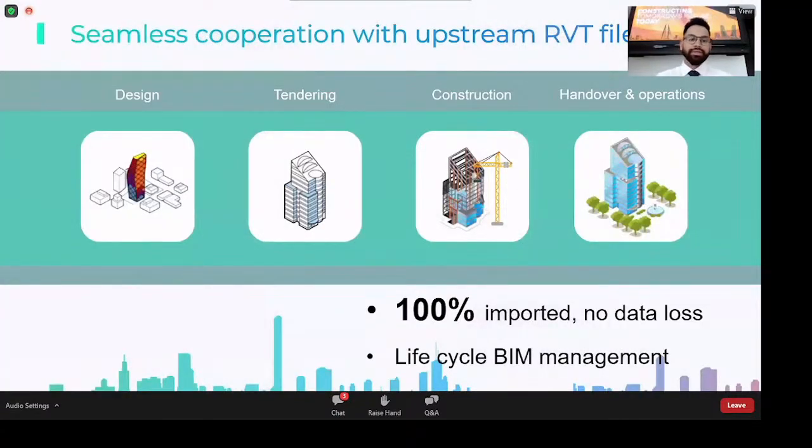To be very honest, once you have a BIM model with information fed in it, it's going to help you throughout the construction lifecycle. Using a virtual model during the design stage, we can verify design at a very, very early stage of the project, which can save us a lot of time and expense by speeding up the process of design changes. Obviously, in every project, we tend to have a lot of design changes. What we noticed and realized is that the lack of cooperation and difficulty of sharing information are the major reasons for the communication issues during an entire project lifecycle.